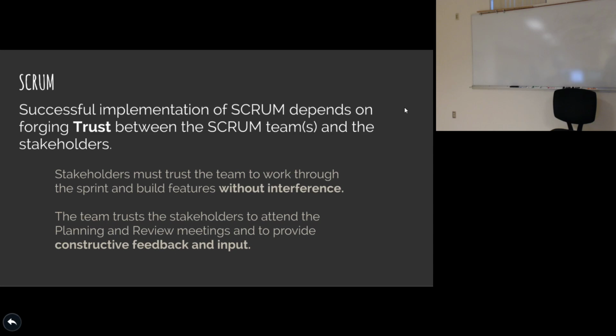So there's a level of granularity when you're estimating software that doesn't matter. There's no way you can possibly be that accurate. The difference between saying that this is going to take me 5 hours versus 6 hours, I can say that I'm probably wrong, right? In fact, the general joke or rule of thumb is take whatever your estimate is and multiply it by time and a half, and that's probably what it's really going to be. If you think this is going to take you 6 hours, it's probably going to take you 9.